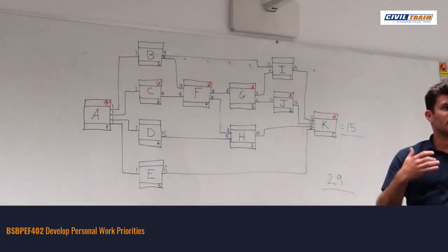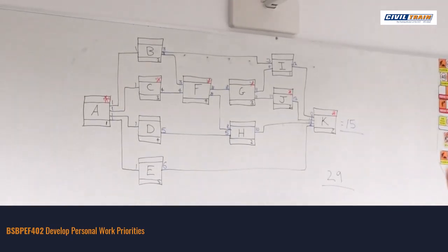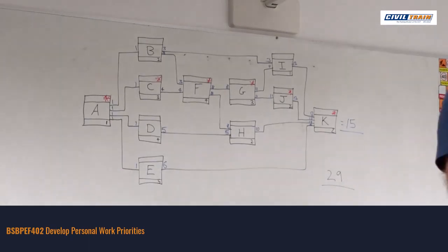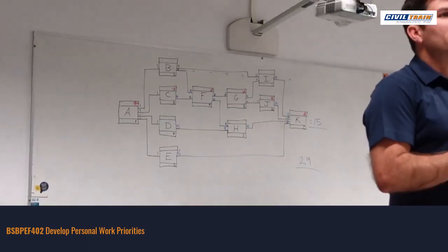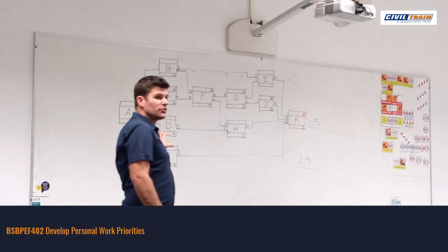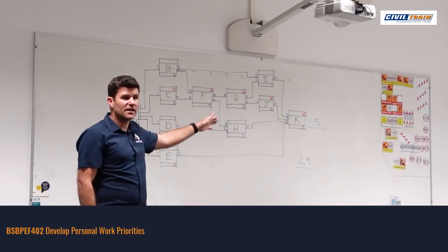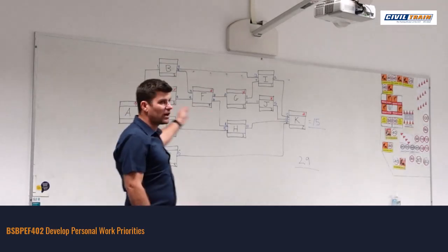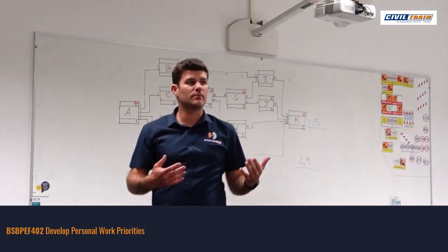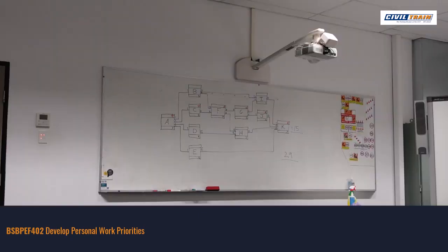Now, if you were to input this data, so if you were to input the tasks, the duration and the dependency numbers, exactly how we've presented on our table, if you were to enter that into Microsoft Project, it would automatically do this process behind the scenes, calculate it, and it can actually show you the critical path based on those algorithms, that calculation.